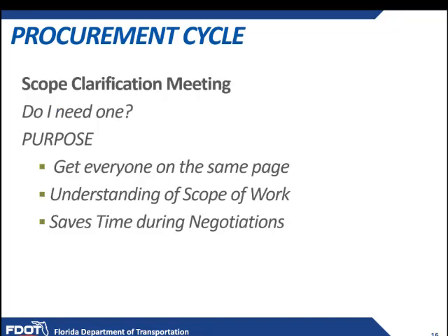Scope clarification meeting. So now we have our winning consultant, and we're moving ahead before we get to our negotiations. So the question is, do we need a scope clarification meeting? Not every project is going to need a scope clarification meeting, but they're very helpful. Their purpose is to get everyone on the same page, understanding what the scope of work is for this project, and it saves time during negotiations.